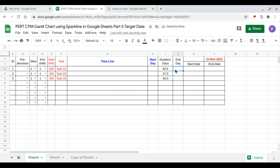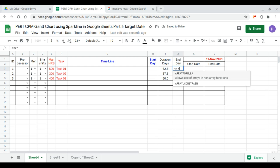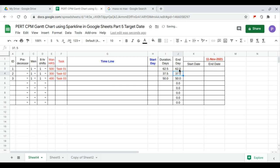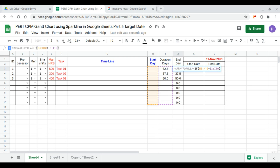Let's say we have one man per shift and one shift per day as our default values. Next, the end date formula is start plus duration. If this is zero then empty, otherwise calculate.